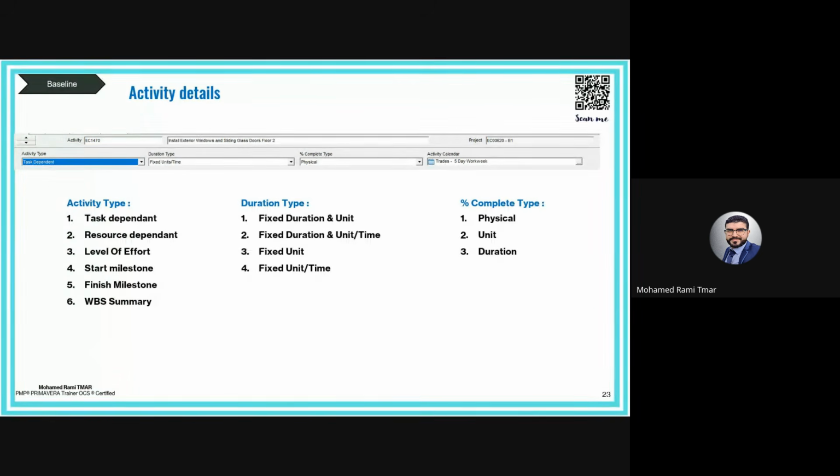They will check the first page, which includes milestones, and it will give them the real picture of the milestone status. And if there is any contractual milestone or intermediate milestone defined in the contract, it needs to be clearly defined and created as a milestone in our schedule.